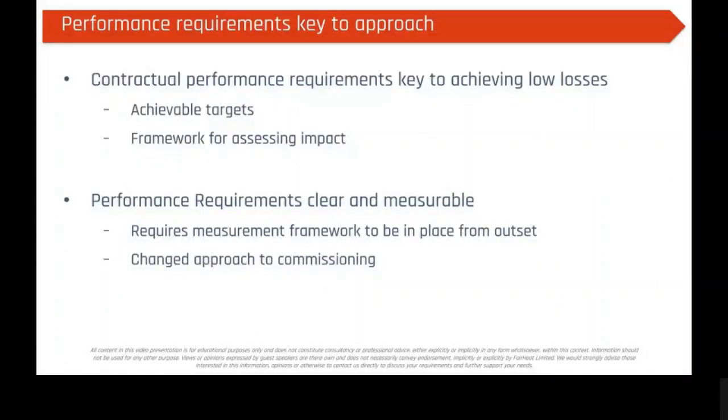If we want a heat network to work well at the end, we need to define what that performance is at the start, and we need a method of saying this is what we want the performance to be once we get to the end, and a quality assurance process is in place that makes sure as the system hands over from different stakeholders, so strategy consultant, design consultant, installation contractor, commissioning engineer, that those performance metrics are tied all the way through.